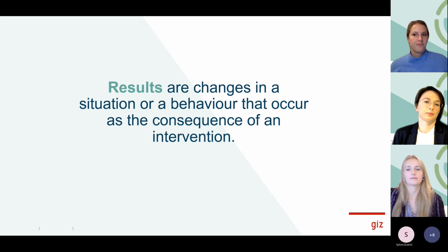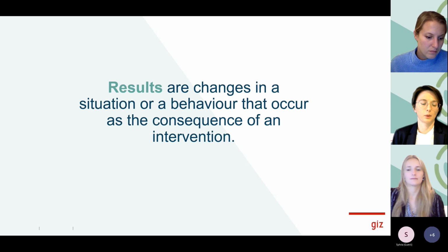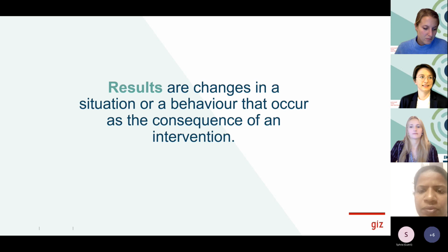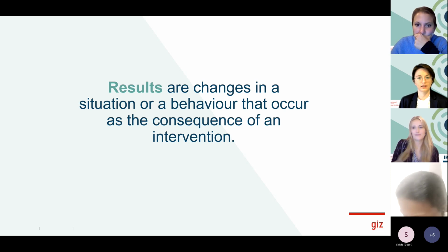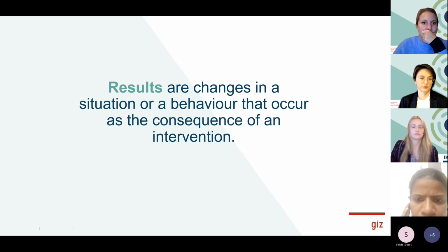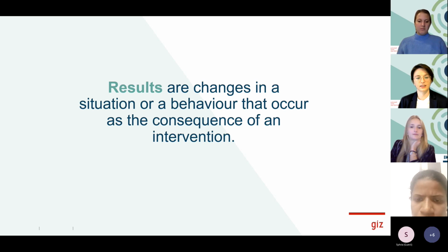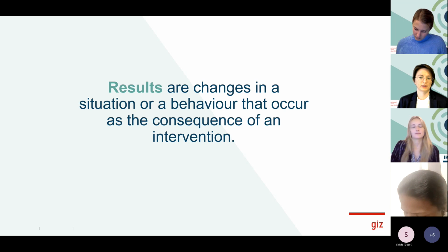And that last part is especially important because with our projects, we usually get involved in very complex social contexts. And of course, we want to avoid any negative repercussions on our target group. An example would be channelizing water to improve irrigation for farmers in the village. That could also reduce the availability of water for other user groups, which might even lead to conflicts. So that would be an unintended negative result. To avoid something like that, we should anticipate those unintended results as much as possible and define criteria for observation in the monitoring system. We will get to the monitoring systems later on. Maybe just one hint here, this is also why we ask you to do a risk assessment and fill in our safeguard system, because this will help you and also us to monitor and to avoid any unintended negative results.